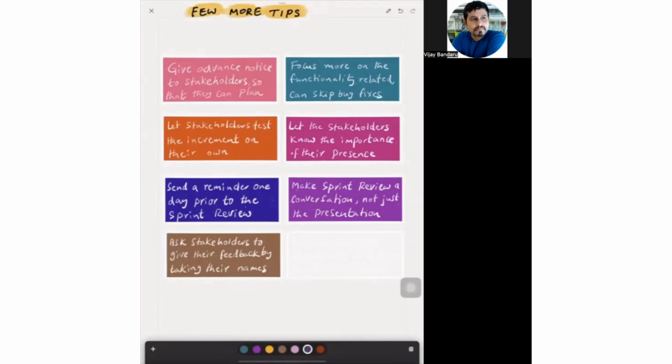Something like that. And then let the developers decide who will demo prior to joining the sprint review. So sometimes what happens is when the demo is going on, maybe they change one developer to other developer. So it will be leading to a little bit of a defocus or time waste. So before joining the sprint review itself, let the developers decide who is going to give the demo, then remaining developers will help them in case they need any answering the questions or just pitch in if they have any issue. So that way also it will be seamless, smooth, and interactive.